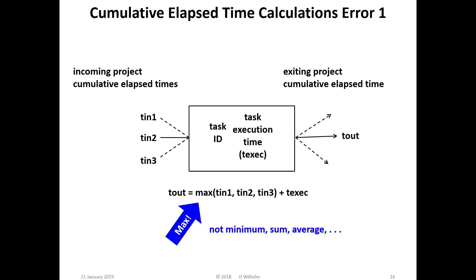One common error in using the PERT diagrams is calculating the start time. The task start time is the maximum of the end times of the prerequisite tasks. Not the minimum, the sum, the average, the square root of the sum of the squares. Just the maximum.